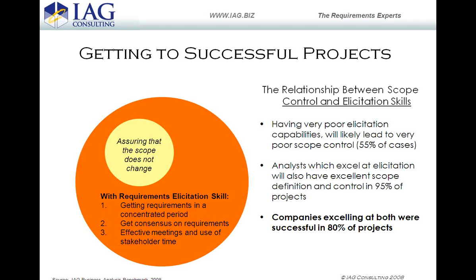So here's, if you're a project manager, and it looks like about a quarter of the people on the call are project managers, if you are looking at the scope documentation prepared by your analyst team, the quality of that documentation is predictive of the likely success overall on your project. So if it is not good, if it sucks, you should walk and not run from that analyst team, okay? You've got to fix that situation because it is very probable that you will have a failure.